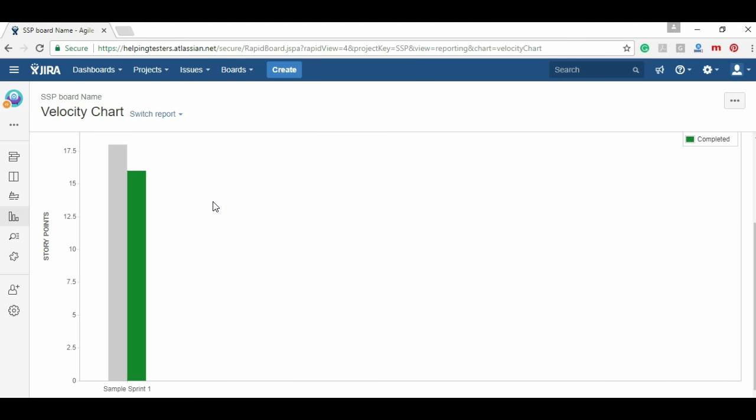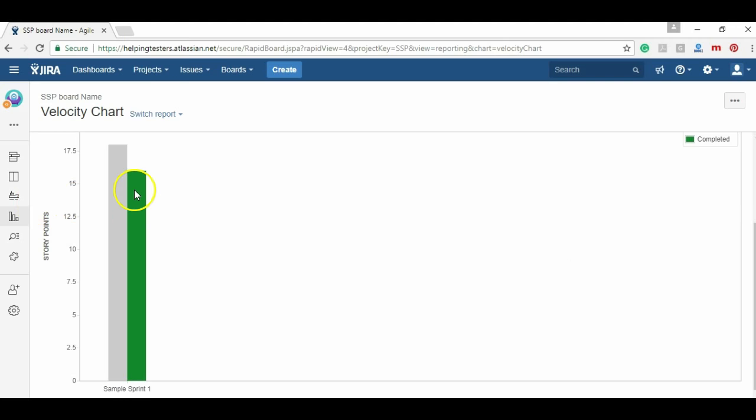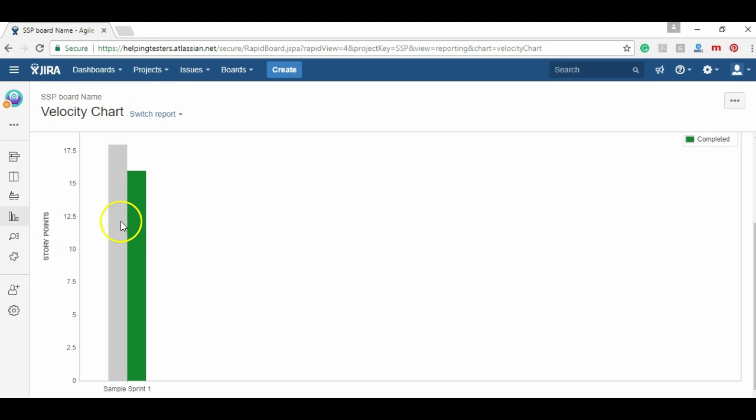The velocity chart - a chart which is generally seen by the managers to identify how much our team can do in each sprint. Like it is for this one sprint. Similarly, if you had other sprints, it would have been similar type of bars. So this gray line shows how much tasks, amount of hours of work we estimated in the sprint, and how much we were able to do. Let's say three, four consecutive sprints we can see that we are able to complete only 10 story points or hours in a sprint. So managers come to know that there is no use for estimating this much. Estimate the task can be done, the time required is for 10 hours only. So this is how the team can be managed.